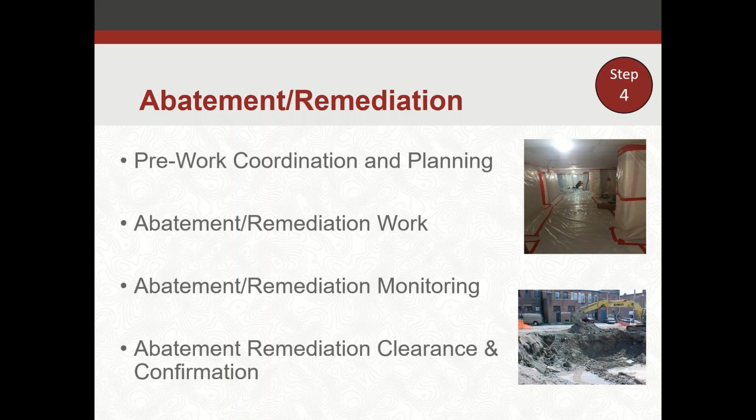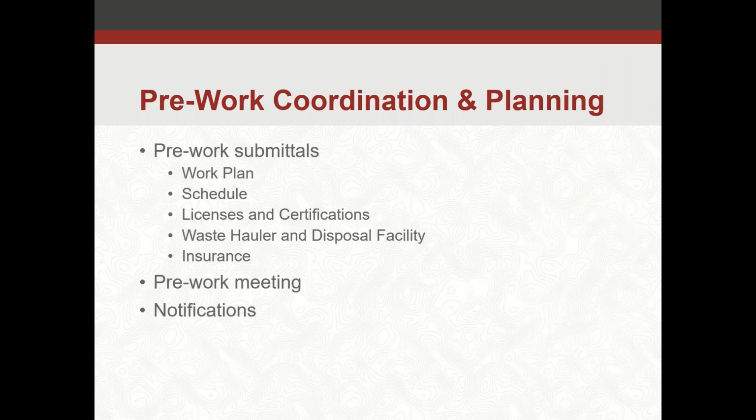All right, step 4 in the process, we're looking at abatement and remediation. Some different components of that: pre-work coordination planning, abatement remediation, the actual work, then the remediation monitoring, and then clearance and confirmation after you're done, just to make sure everything was done appropriately.